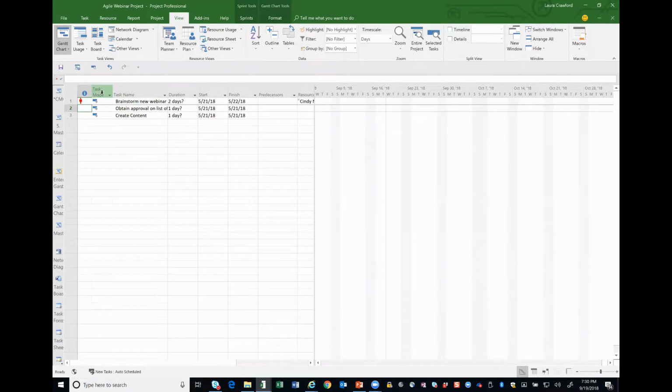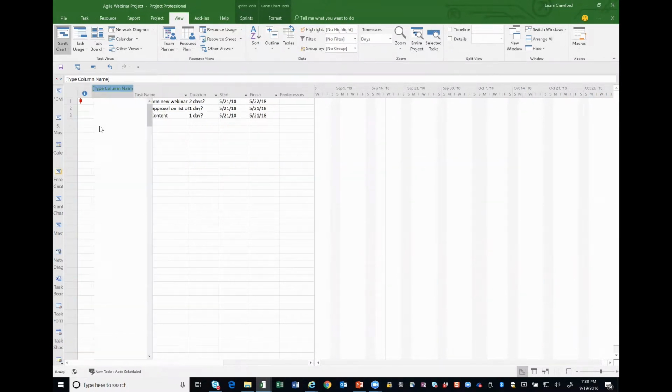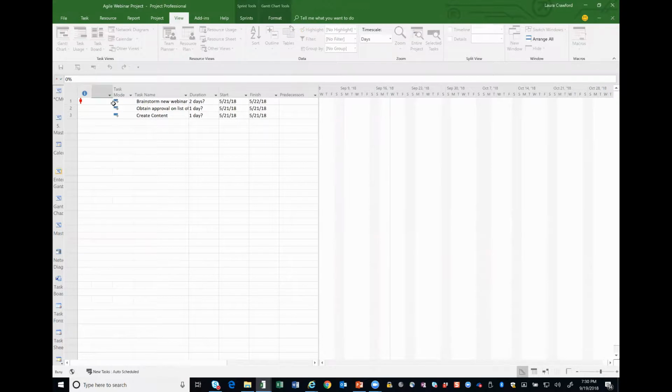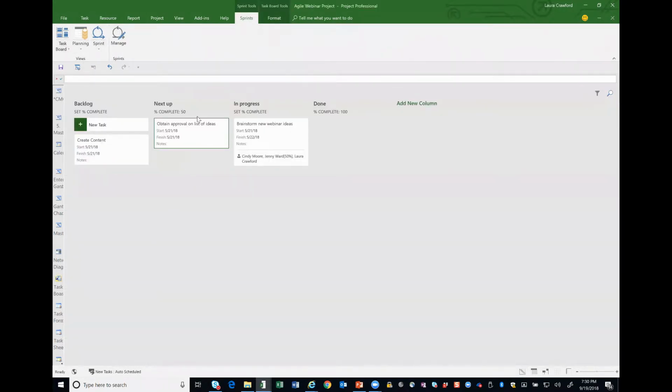But now if I go ahead and insert my % complete, and yes, I know my edits won't be saved. All right, you'll see there 50%. So anything that I do on that page, if I mark those as 50% complete, it'll show up here as well. So the task now is considered to be 50% finished. All right, okay, so let me go back here. All right, so that's pretty cool. So especially when it's 100% complete, you can just drag and drop, and then those tasks, of course, are going to be marked as complete. All right, so that's something that's been new and improved.